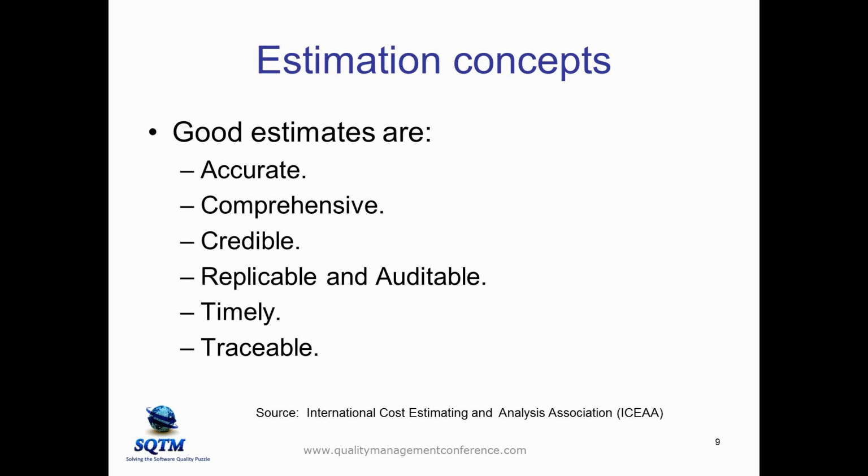Well, gosh, this one's not worth it. This one's not worth it. Skip this one, we'll change our manual process on that one. And so the business users on their own went through and modified their requirements intelligently, based on understanding what the costs were for what they were asking for. And that ultimately resulted in a 30% reduction in the costs.